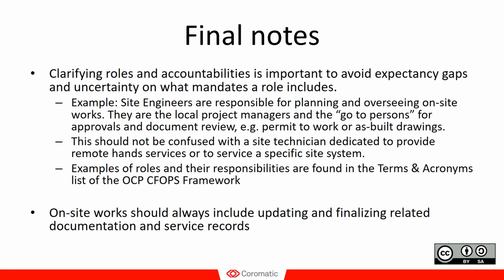You will find examples of roles and responsibilities in the terms and acronyms list, which is part of the OCP CFOPS framework. And remember, this regards on-site works, so they should always include the updating and finalization of related documentation and service records. For example, if you have remote hands that do cabling and patching work, of course, this means that the network mapping needs to be updated and the documentation accordingly.